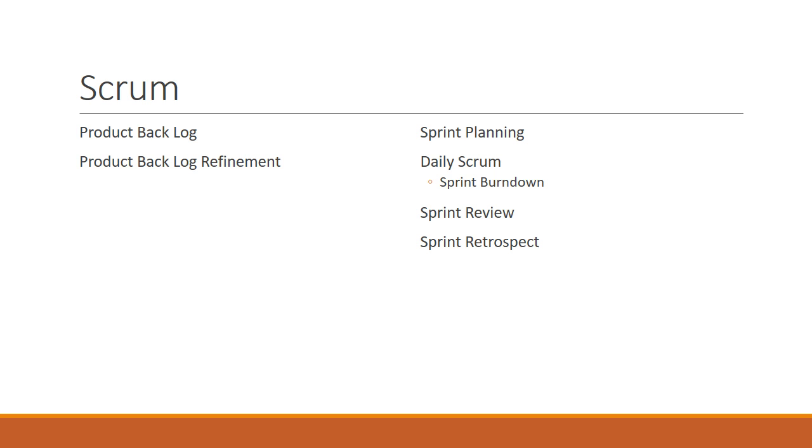At the end of a sprint, there's a sprint review meeting, which is when the Scrum team meets with the product owner and presents to him what they've done, going down the list of backlog items. There's a list of things that must be conformed to in order for those backlog items to be completed, things such as tested, checked in, and reviewed.